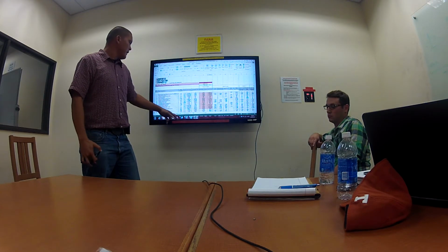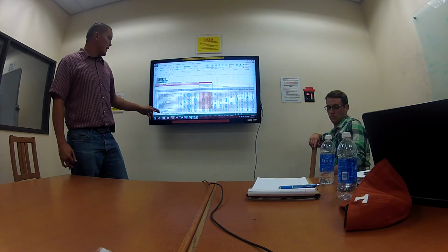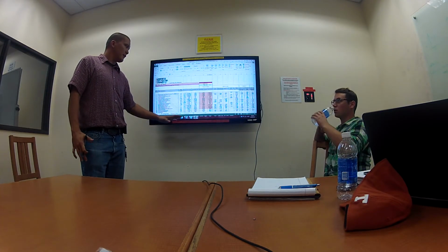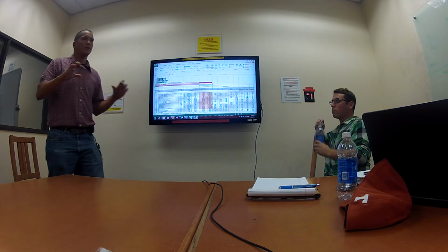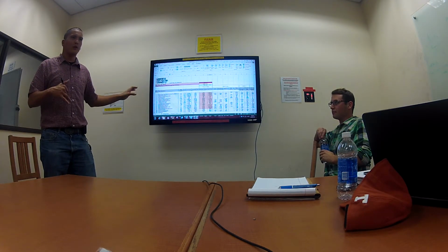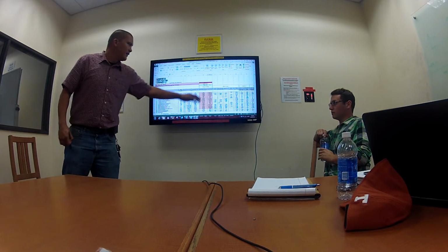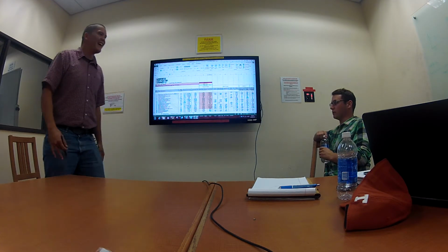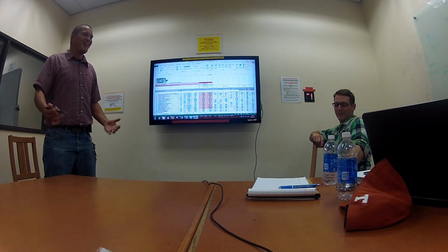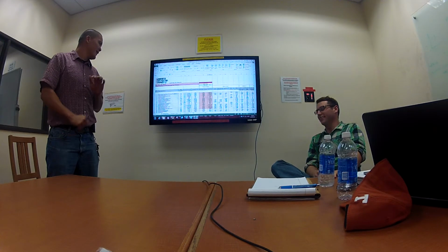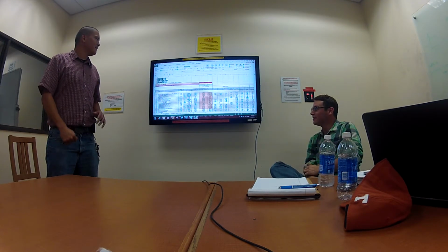And usually, when you're closing out and you have adds and cuts, at the bottom of this sheet, I don't have it on here, but what we do on bid day is we have a running total of adds and cuts that we're making for closed out items. Because if you win the job, you have to go back and set up a real budget, and know where you came up with that number at the end of the day, right?